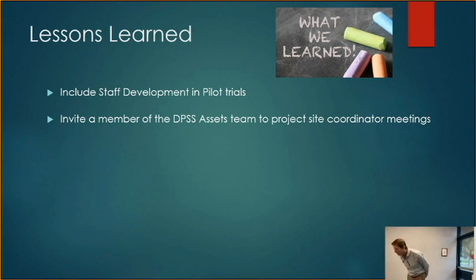Second lesson learned was invite a member of the DPSS Assets team to project site coordinator meetings. This is for you, Claudia and Josh. I can't believe that it took me 3 years to figure that out. I don't know why I didn't have you at every one of those meetings, Josh. It would have been great. You would have known what we were saying in the meetings. You would have kept us honest, and we would have all been in agreement. Next time.